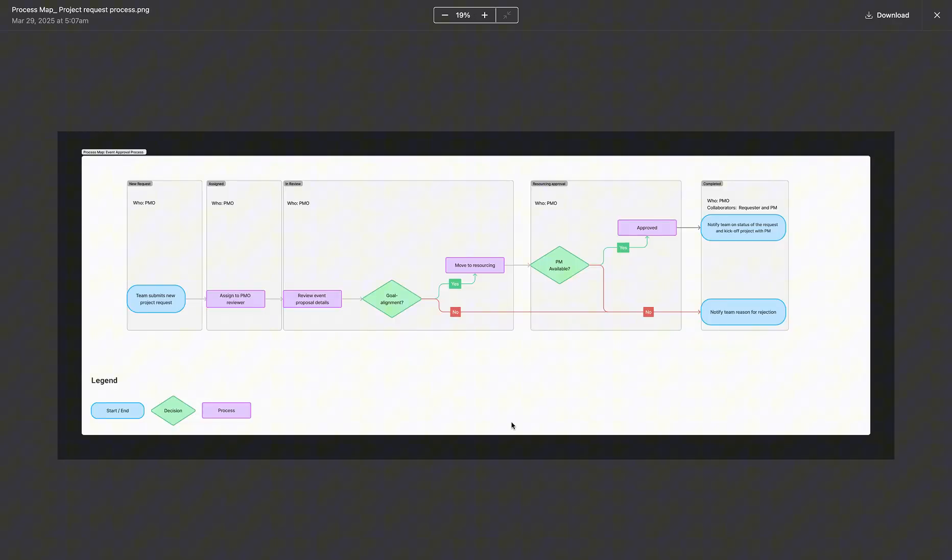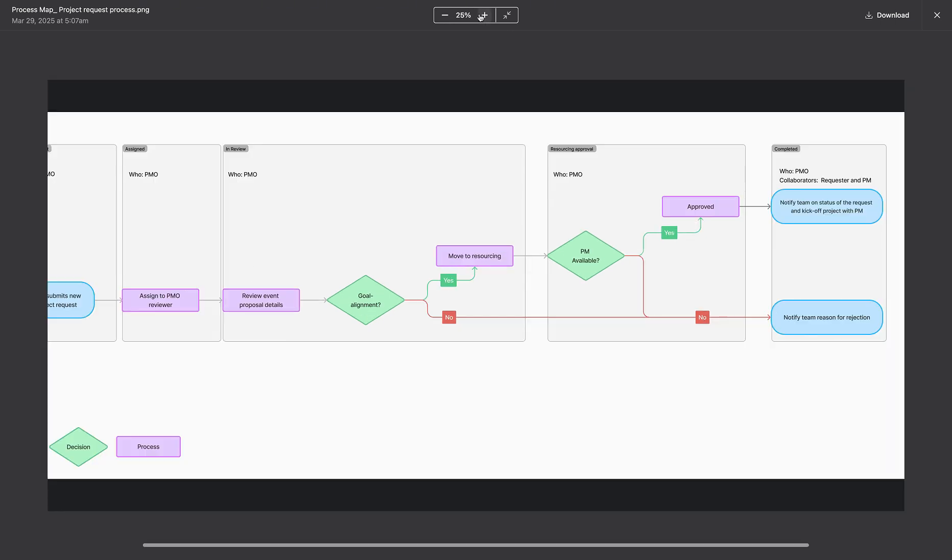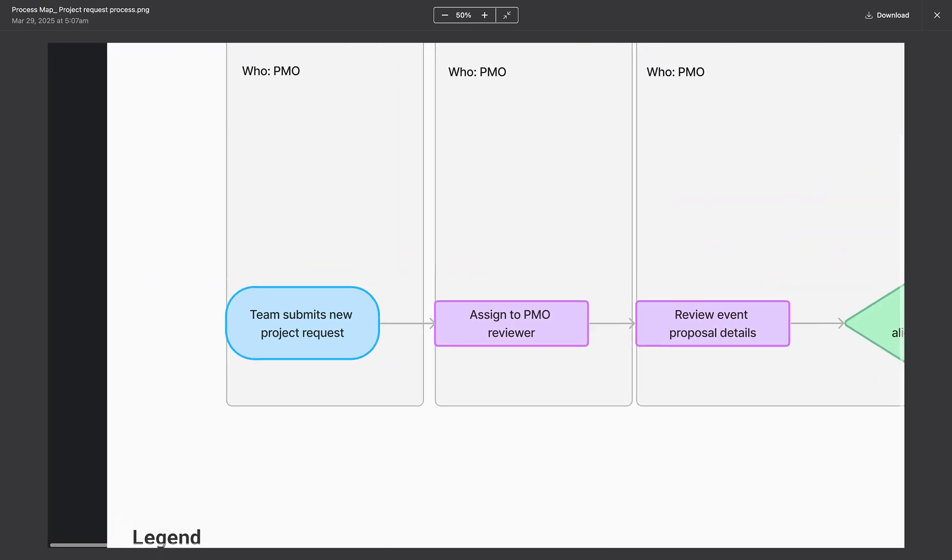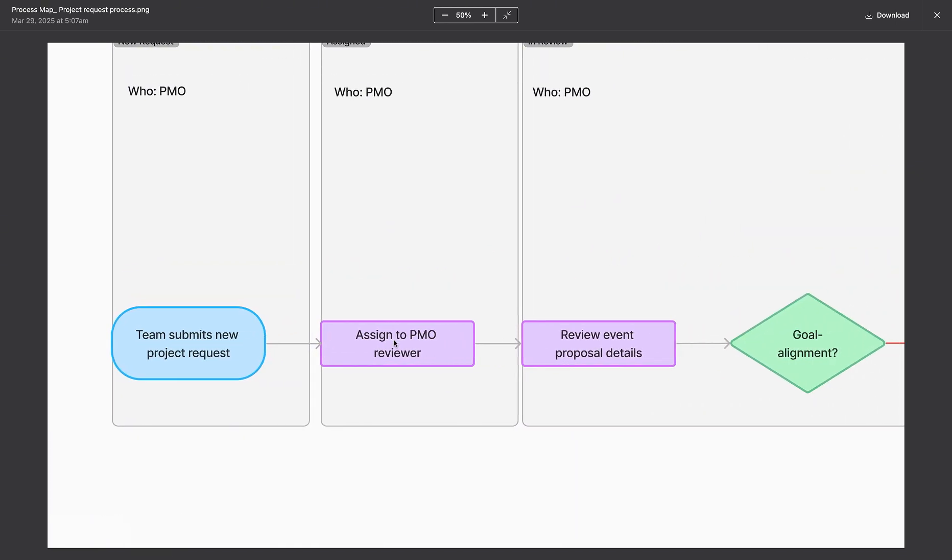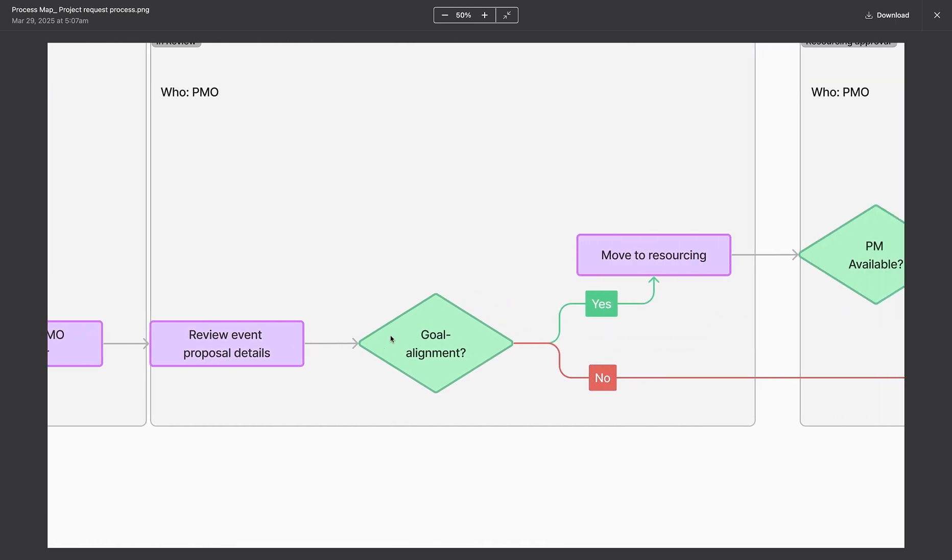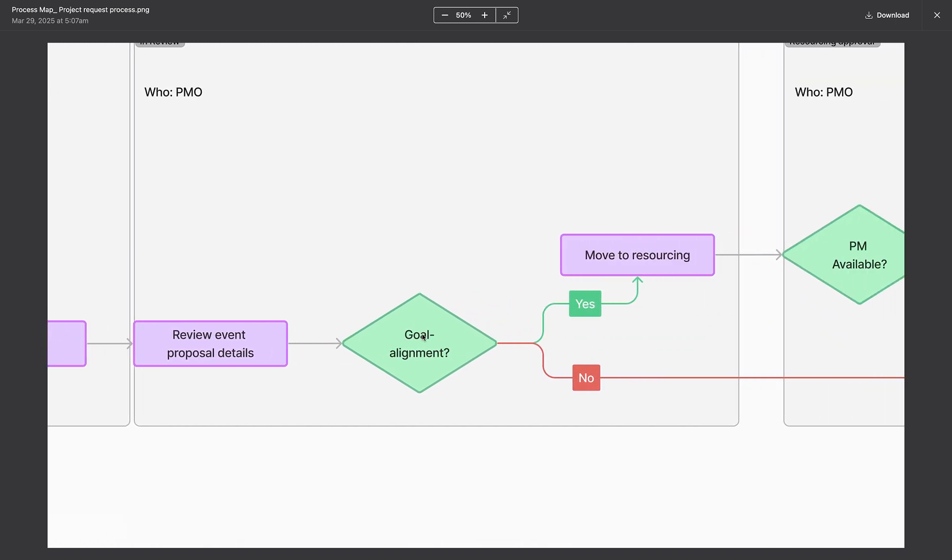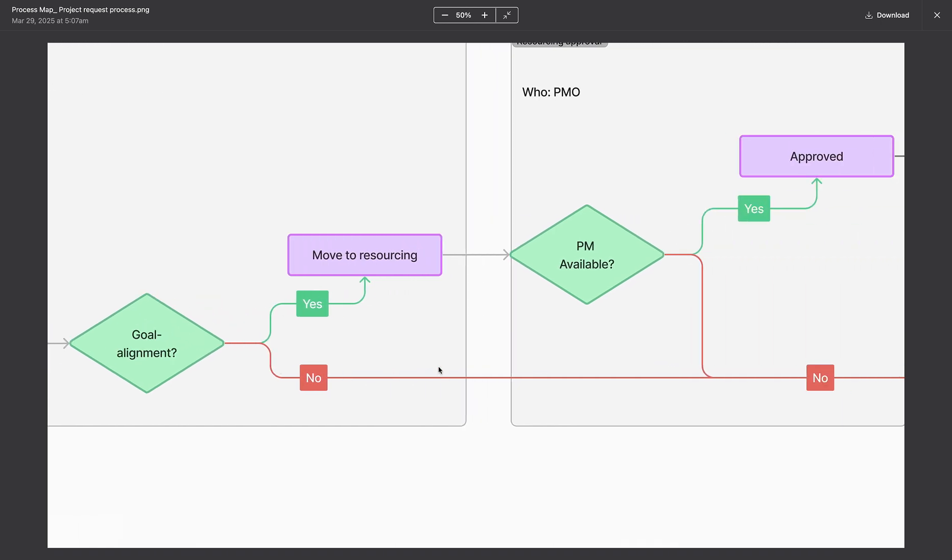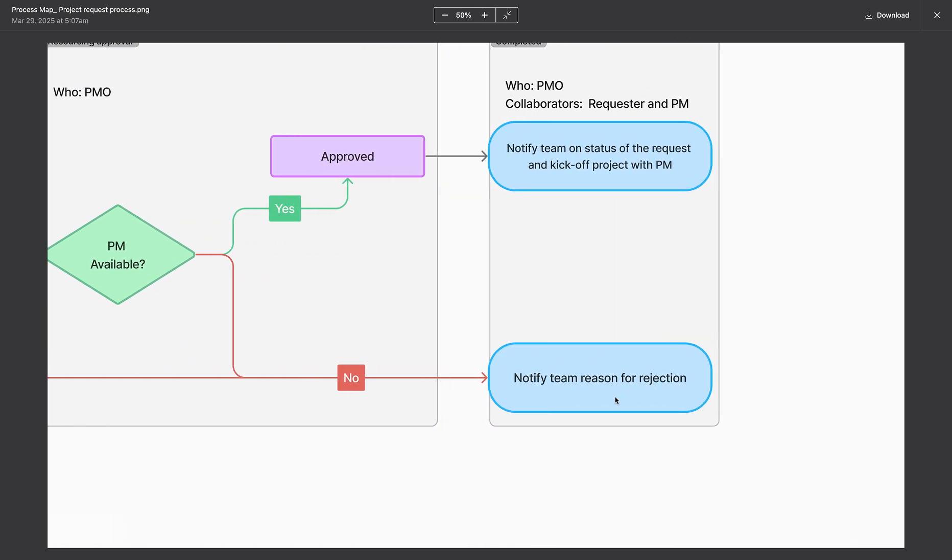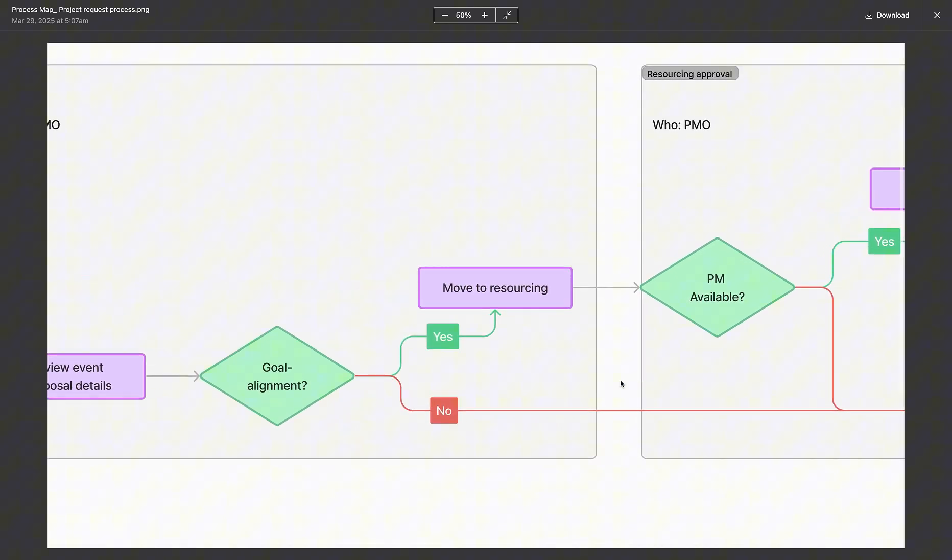The next thing I did was to design a data map that shows how this particular process goes through from the beginning to the end. And you can see from the beginning, we have the team submit a project new request. It's assigned to the project management office and it's being reviewed. If that particular project aligns with the company goals, it's moved to the next step. Else, it's rejected and information is provided to the project submitter.